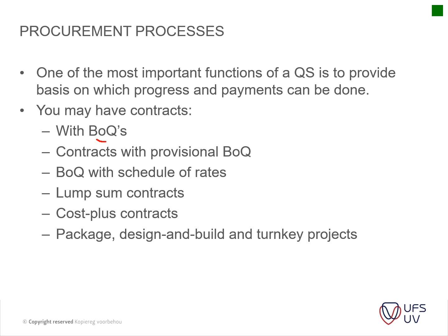Okay, then that is usually a big portion of your contract documentation, because the cost or the estimate or the quote from the contractor is based on that. So the BOQ with schedules, you get different types of BOQs. You've got BOQs with schedules of rates, where the quantities aren't necessarily measured, but the rates of the contractors are given and then just applied as more information gets available.